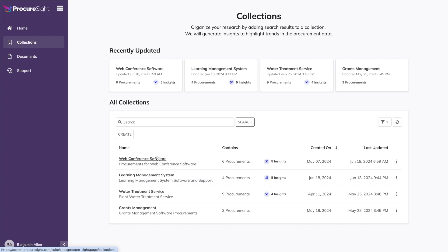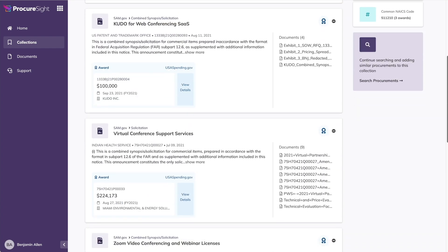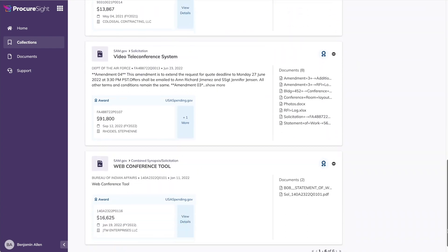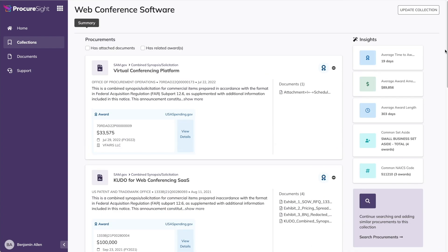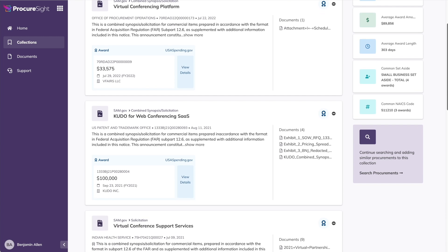You can continue going down the results and adding more, and when you're ready to review the collection, there's a link in the left navigation to review your collections. You can see here I have four collections started. Each one has varying numbers of related procurements that I've associated with it. Let's look specifically at the web conference software collection. From the collection summary, you'll see all the procurements I've added so far, six in total. But what's really powerful about this view is now that ProcureSite knows these six are the most related to your new procurement, we can begin identifying insights which you can see here on the right. We show things like average time to award, average award amount, average award length, common set-aside categories, common PSC and NAICS codes. Depending on the collection, you may have more or less of these insights available to you. The goal is to provide you with better context about the potential acquisition process and the market for a given procurement, all without you having to manually compile these metrics.